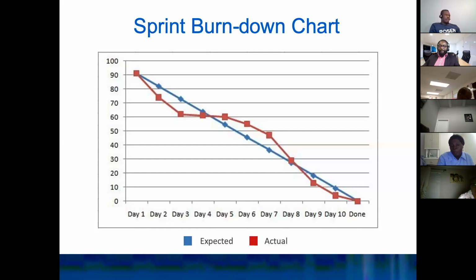It's the opposite. Every time the actual graph is on top of the expected graph, they're behind. And every time it's below, they're moving fast, ahead of it. Oh, really? That's correct. Yes. Okay. That's correct. Because you can track down on the number of days. Like let's say day 1, they were actually on point. Day 2, we can say day 2 until day 3 they were ahead because they're releasing quicker than the actual graph. That's exactly right.